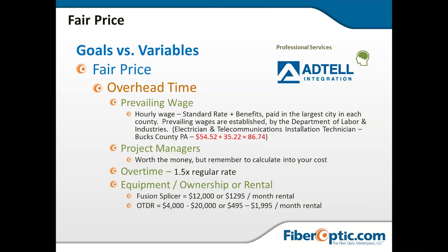And if you're a customer and you need something quickly, it's worth it to pay the 1.5. Talk to the contractor, but pay it. Because if you go into another day, you've got those people spending the night there, you've got additional costs, you've got their 1 times rate. But if you can continue to push through and not have the overhead of another night there and travel and all the other things that go into some projects, a lot of times the 1.5 times rate is a good number to spend to get that project completed in a timely manner.